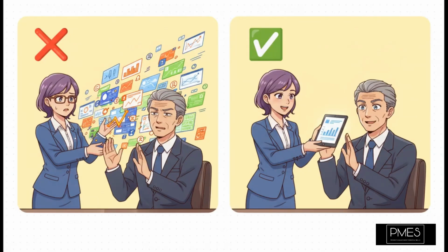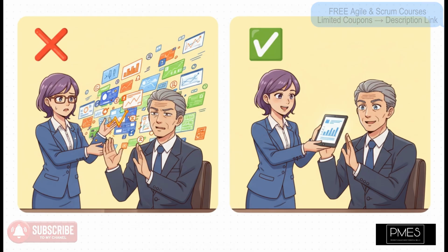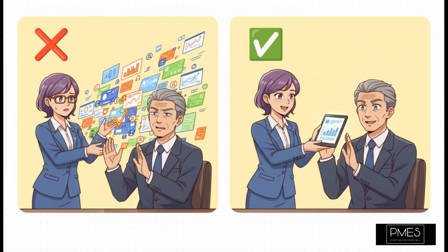Here's another big one, the Manage Closely misconception. It's so tempting to assume that anyone with high power automatically goes into the Manage Closely bucket, but that's just wrong. The correct PMP logic is all about being precise. If a stakeholder has high power, but their interest is low, the right strategy is keep satisfied. Overmanaging them is a waste of your time, it's a waste of their time, and honestly, it can even come across as annoying. The exam will definitely test if you get that nuance.